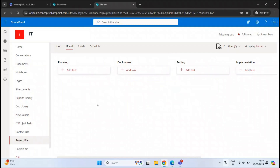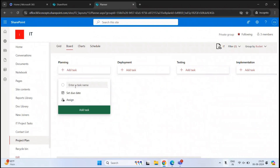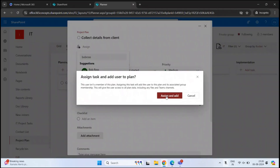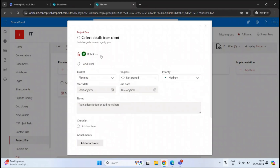Now let's add tasks — tasks are basically the assignments we are going to assign to users. To add a task, click Add Task under the particular bucket where you want to create it and give it a name. Let's create a task called Collect Details from Client and click Add Task. Now the task is created. If you click on the task, you can assign it to someone — let's assign this to Bob Ross. Click Assign and Add. This task is now assigned to Bob Ross.